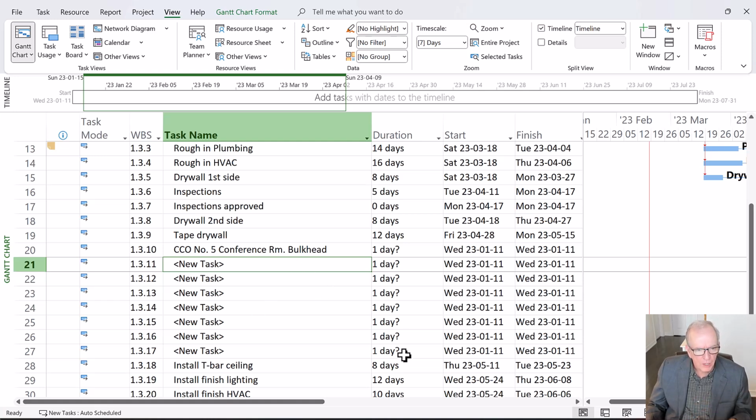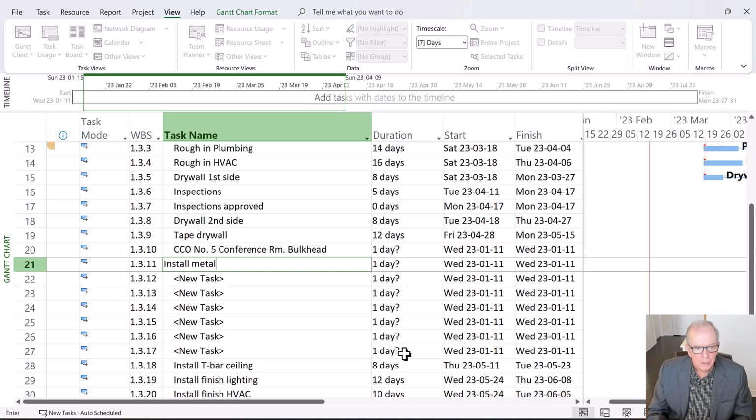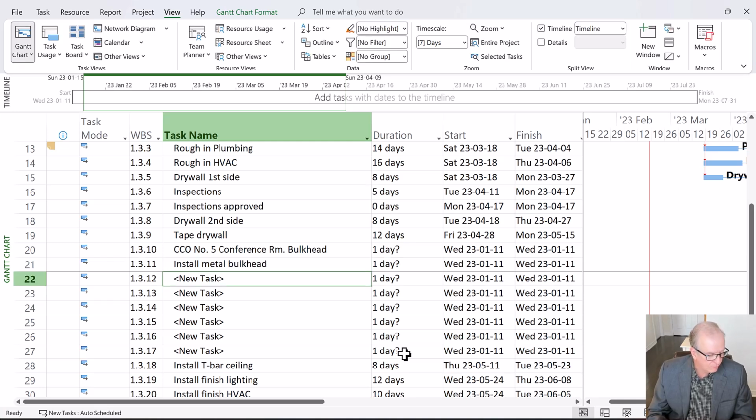And so here I am going to insert the activities that I think are required for this bulkhead. What I'm doing is inserting a mini project into my overall project. In technical terms, it's called a fragmented network. It's this series of activities, a network of activities, because you want to have everything interconnected, and that's key, into our schedule. If it was your project, you would know what the names of the activities are. It doesn't matter what kind of project it is. I'm talking construction, but it really doesn't matter.